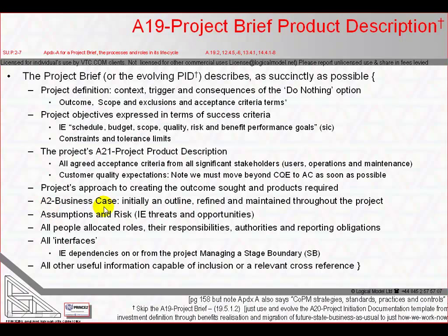No record of business case or benefits would be complete without expression of risk. Assumptions and risks, i.e. threats and opportunities, and unknowns and uncertainties, are a material fact that needs to be passed to the project board when they use the project brief to make the decision as to whether to authorize initiation.